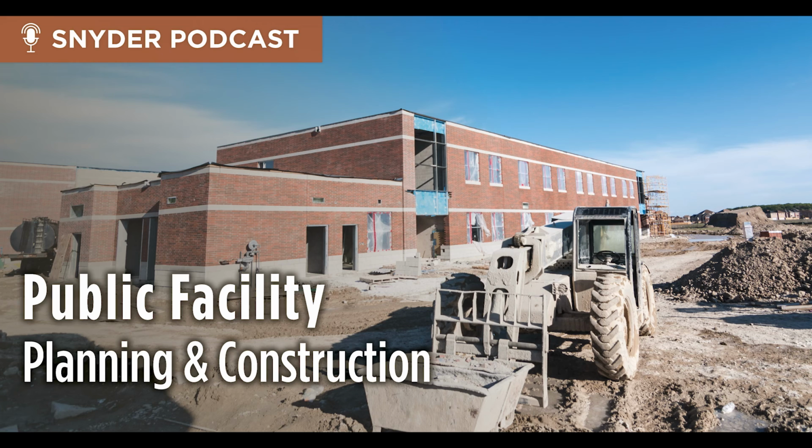A second option would be for a 6-month building. Maybe you have something that's a little smaller or more associated with a private development type of project, like an apartment building that might still have some significant design features to it. A July bid could be an appropriate time to do that and get your August demolition and grading done with September utility and foundation work. That would allow the building to start in October and extend over the winter. And then you can finish up the site work in the spring with that June 1st completion date.